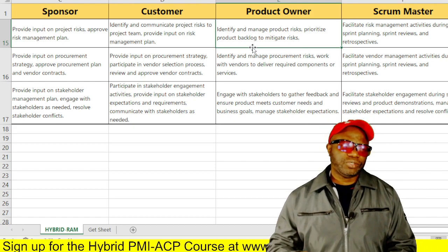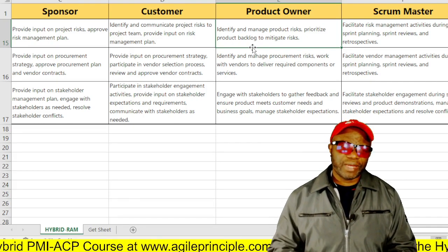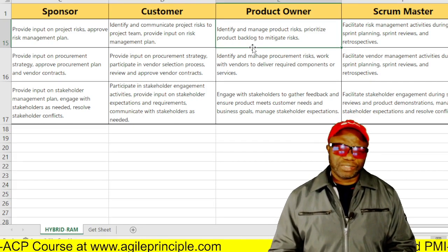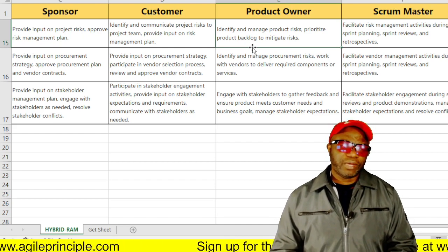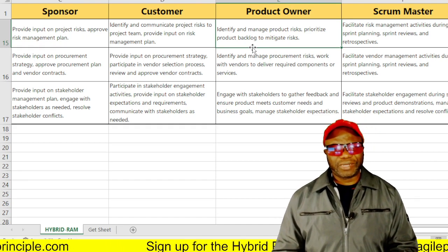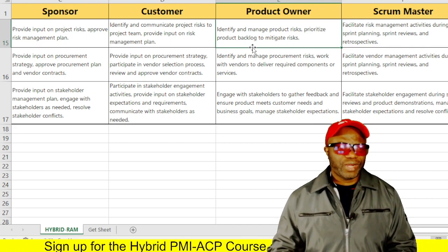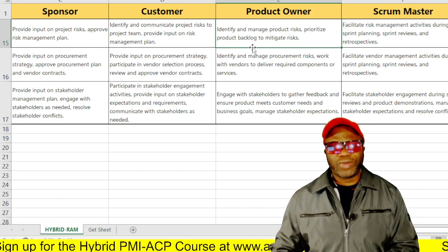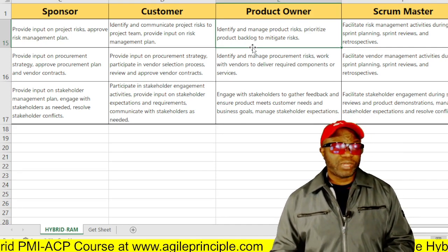So what you choose to do first, you want to do the big ticket value items that have the largest amount of risk. And someone says, but why is that? Well, if they have risk and complexity at a high level, but they're also very valuable, there's no escaping it. You have to do it. So why don't you do it first so that the complexity and the risk is reduced over time, rather than waiting to the end and there's a big bang and then you flop and then you don't deliver what is most valuable?